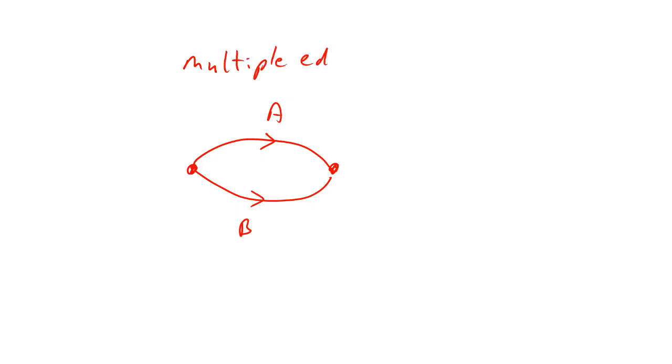Now, the big no-no in drawing these graphs is having a situation like this where you've got A and B. That's a case of multiple edges, yes? So you're not allowed this. So if you're wondering what all that early theory was you did, there was a reason for it. You can't have multiple edges in your graphs. That gives you two options.